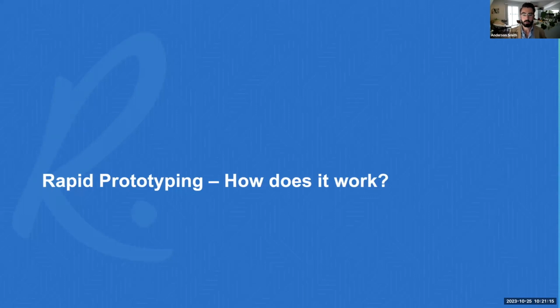That you time-bound that project, as I mentioned earlier, where you say, okay, we'll do a rapid prototyping project. We're going to cap it at 4 weeks. We'll try to iterate through different designs. And at the end of that 4 weeks, our goal, of course, is to have a clear understanding of that solution and what that would look like, so we can build it out in a production state.